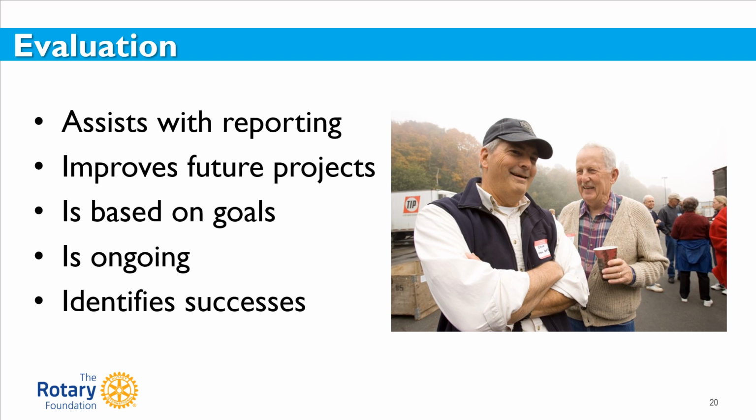Remember to use goals set during the planning stage to evaluate the success of a project or an activity. The data and evaluation method and frequency should be set up during the planning stage as well. Project evaluation is an ongoing process, and it happens during implementation through completion and beyond.